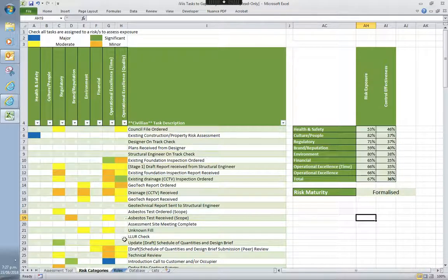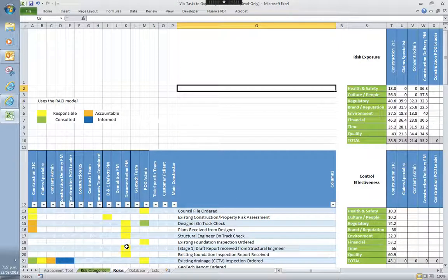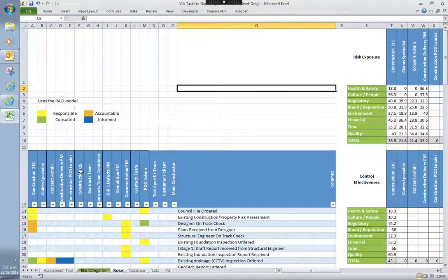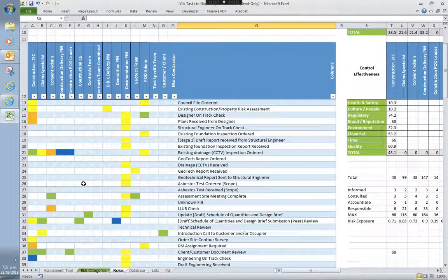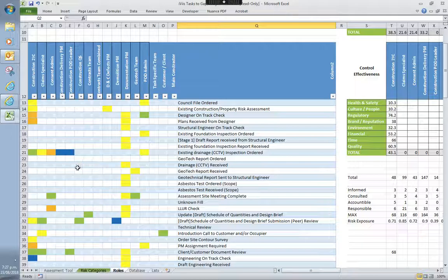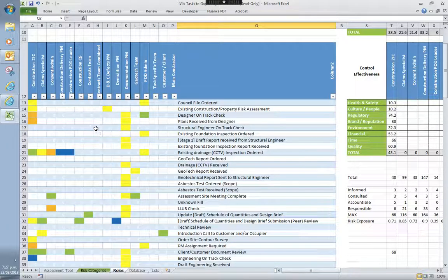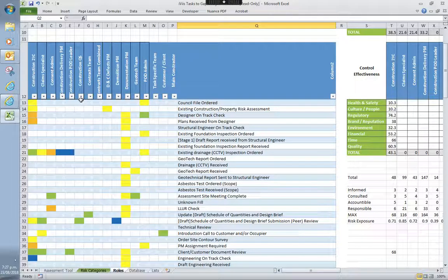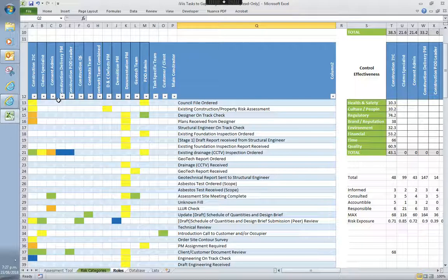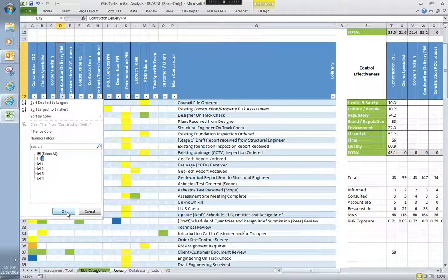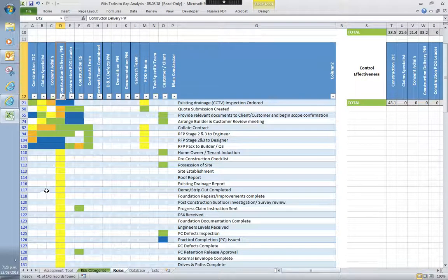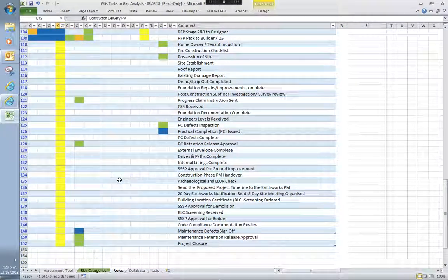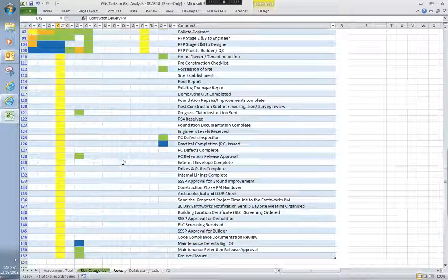The next part that looks at is the roles. And this is based on the RACI model, which is responsible, accountable, consulted, and informed. So what that can then tell you is where the risk is actually sitting with your employees or the people that will be employed for that project. So if we take, for example, let's go construction delivery PM. So if we look at all of the tasks relating to the construction delivery PM, that tells us all the work that he is involved with. I do have a little bit more to add in there. I'll go into that later.